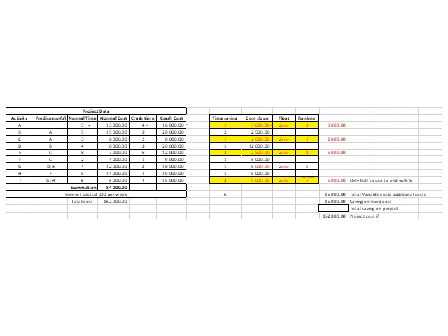So we look at C and identify a 2,000 rand difference here, and then for our next item we've got 5,000 overall divided by 2, so it's 2,500. Okay, and then we've got our other item highlighted on the critical path, G.